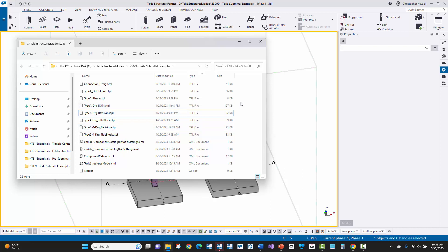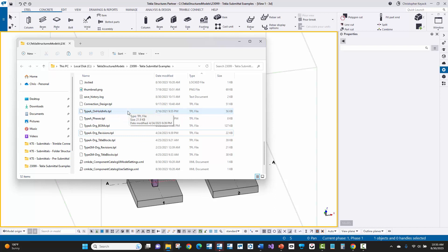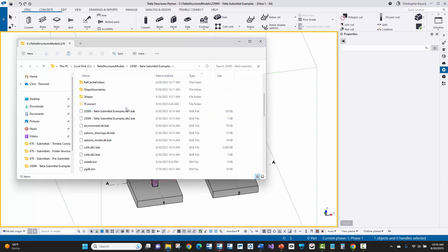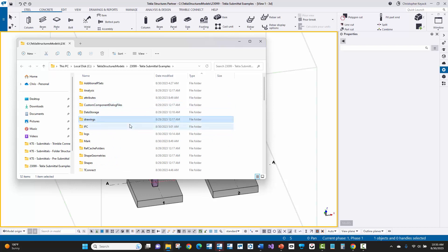When you submit the Tekla Structures model to the fabricator, I would recommend that you have all of the files required for the drawing title blocks, any custom objects IMP files, any and all of the profile catalog, material catalog, all of the files related to detailing and viewing that model properly, as well as including the drawings folder — so if you have your drawings created at a particular submittal, you have everything required.